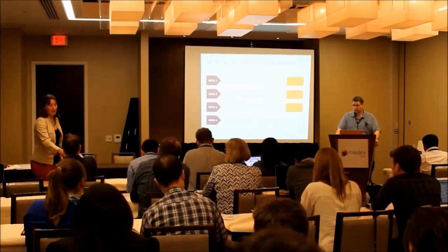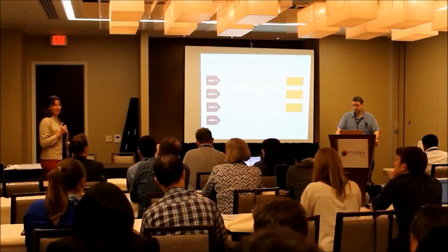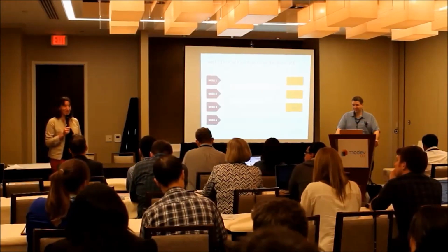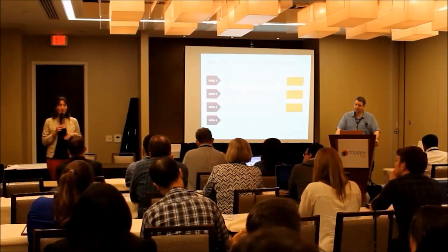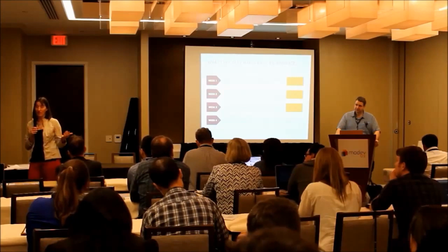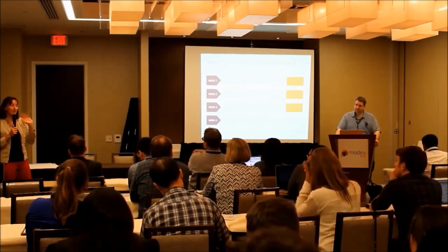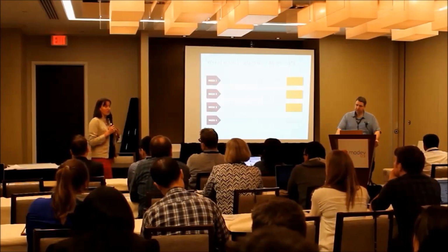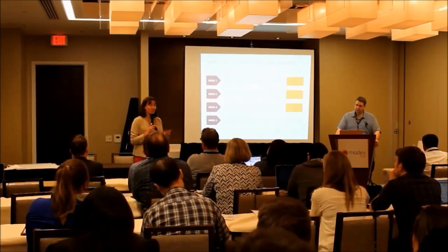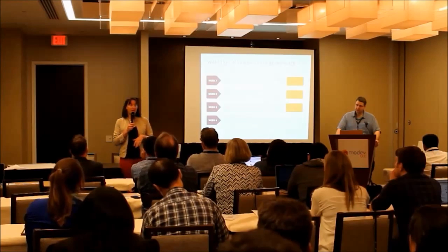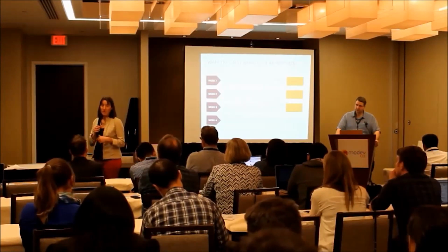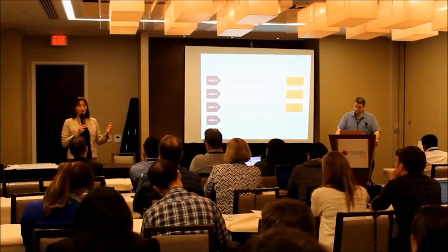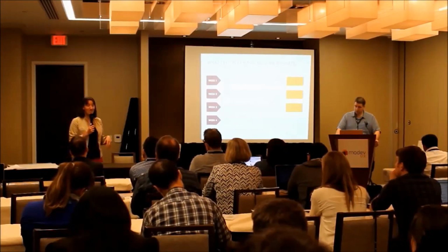Sure. You probably heard that question. Use the microphone. Yes, the short answer is yes. We generally do 2-week sprints for everything, outside of these really fast rapid prototypes. We have something we call adaptive PLM, which is our flavor of Agile. And our flavor of Agile is specifically designed around remote teams and mixed teams. So we usually would have a situation where part of the team is client, part of the team is us.